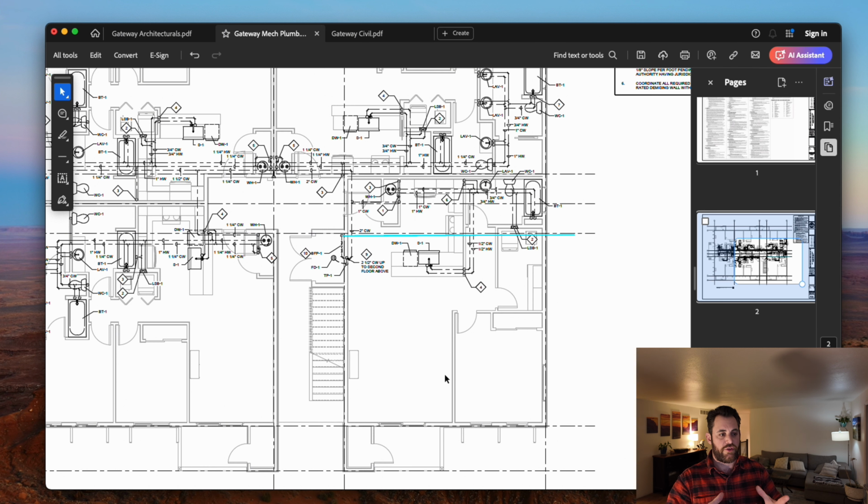And the problem with this condition is that in the event this water line were to break, we're in Idaho, right? Freeze thaw happens all the time. Water breaks do occur. They're not frequent, but they do happen. And what I would suggest to the owner is that we relocate this line or change the orientation of that mechanical room to reduce the risk of that, because that's a significant risk.